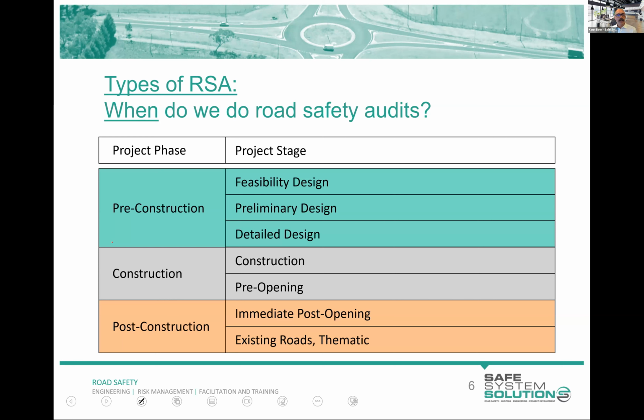Then they're into building it, in the grey there. So you can undertake a road safety audit at the construction stage. And then the pre-opening: they haven't opened the road yet, but they have got everything finished. And then post-construction, the immediate post-opening audit, or just called a post-opening audit mainly.